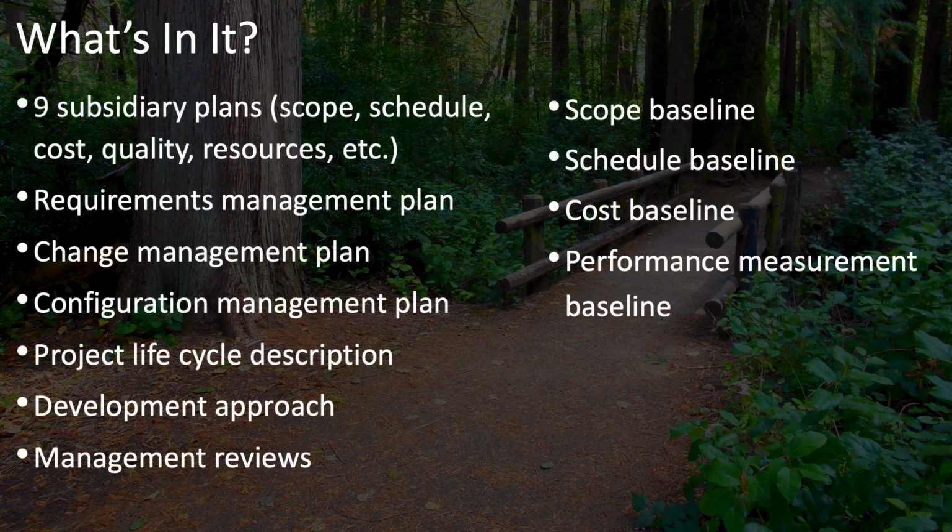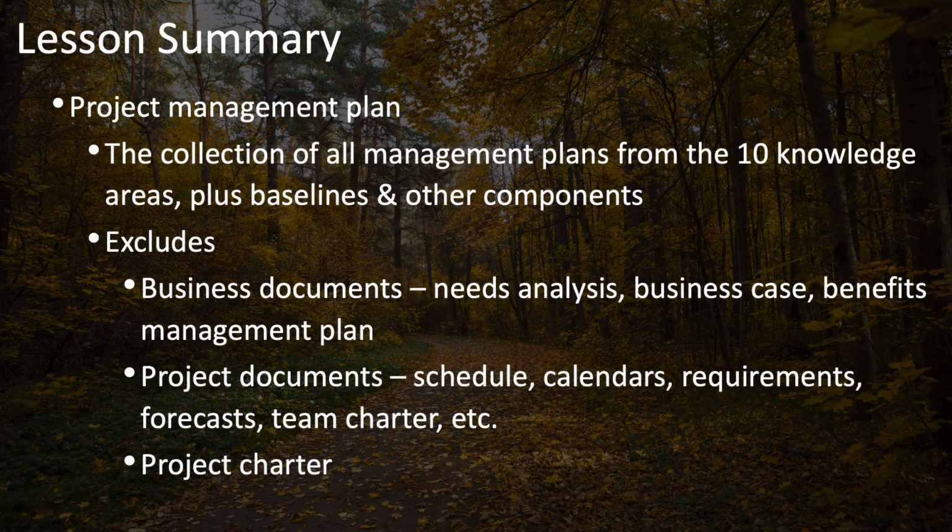It includes the 9 subsidiary plans, the requirements management plan, change and configuration management plans, the project life cycle description, the development approach, the schedule of management reviews, the baselines for scope, schedule, cost, and the integrated performance measurement baseline. Plus baselines and other components, and it excludes business documents that came before initiating the project, such as the needs analysis, the business case, and the benefits management plan.